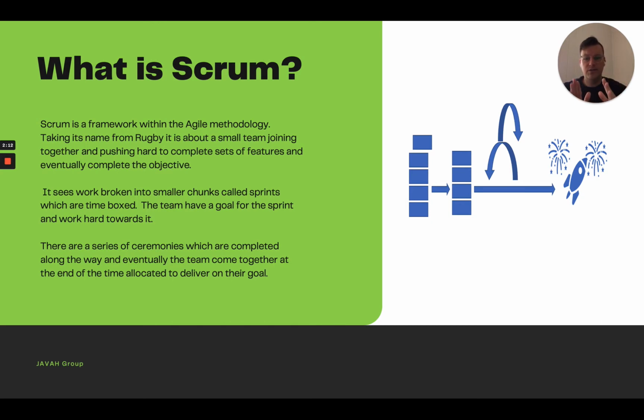But what we're doing is we're breaking off a little chunk. We're setting a goal for that sprint. In one of the other videos, I spoke about upgrading a system. So the goal of the sprint could be upgrade user login. And then all of the tickets within that are to do with changing the way that the user logs into the system. So our goal is to complete that, and we work with these small chunks of tickets.